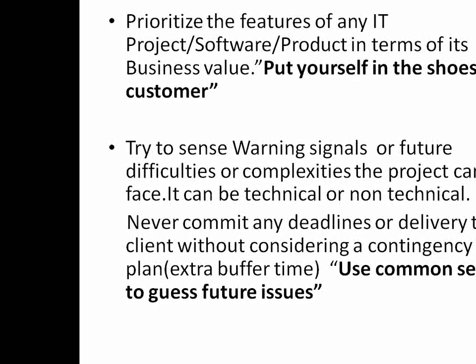Suppose I have 10 features. Feature number 1 has the most business value. It is like 80% of the value, and the rest of the 9 features hold 20% of the value. I can use the Pareto principle, the 80-20 rule, and concentrate my time, energy and focus first on feature number 1 because it holds the maximum business value.